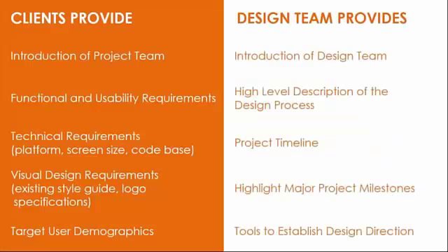So by the end of your kickoff meeting, you should have this information at a bare minimum. The client should have provided an introduction to their team, and your design team provides an introduction to your team. You go over all of the requirements, whether they be usability, technical, visual design, et cetera. You cover the target demographics. And then the design team needs to provide a high-level description of the design process, show a timeline, highlight the major milestones, and finally, offer tools to establish design direction, which is what we're going to cover in our next step of the process, discover.